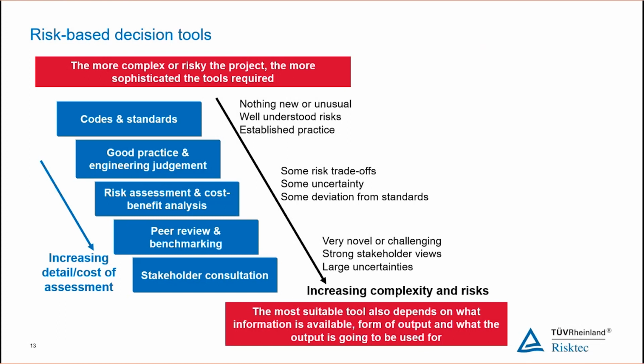These are tools that have been developed elsewhere within industries, and they are very good tools that can easily be used here. But there is an increasing level of detail in our risk assessment. As a general rule of thumb, the more uncertain the risks, the bigger the risk, the greater our need for assurance, and therefore the greater our need for increasing levels of detail and different approaches within our risk assessment process.